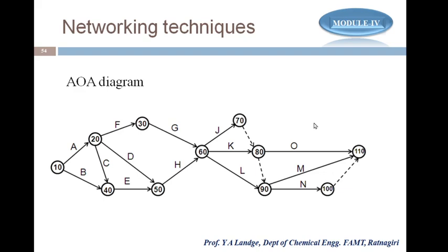So what we do, we are drawing activities, we show them on the arrow. B is again shown on the arrow, similarly C, D, then F, then E. Because if you see here, as A and B start, once A is finished, then C, then D and F start. And then we are showing this node just because once B is completed and C is completed, then E starts.